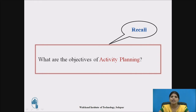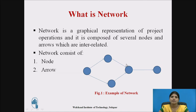Pause the video for a while and think about what are the objectives of activity planning. Now, what is a network? Here the circle represents the node, and two nodes are connected with the help of arrows. A network is nothing but a graphical representation of project operations, composed of several nodes and arrows which are interrelated. A network consists of two elements: nodes and arrows.